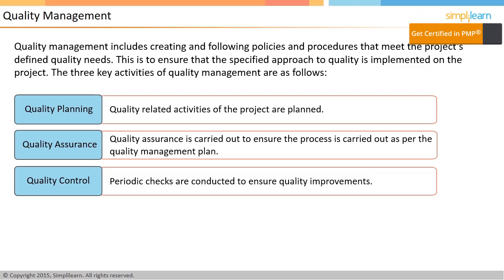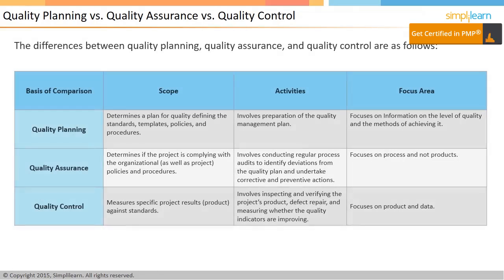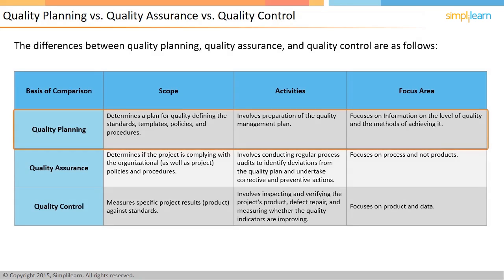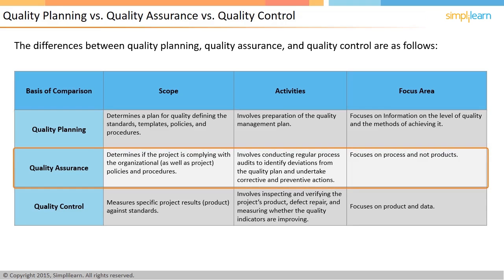In the next screen, let us look into the differences between the three aspects of quality management. It is important to understand the different kinds of activities that come under quality planning, quality assurance, and quality control. Once quality planning is done, the quality management plan is ready. This plan has standards, templates, policies, and procedures to be followed in the project, and it contains information on the level of quality being aimed at and the plan to achieve that level. Quality assurance activities ensure that the activities planned under the quality planning phase get executed for the project. Quality assurance determines if the project is complying with organizational as well as project policies and procedures. This is ensured by conducting regular process audits to identify deviations from what is planned in the quality management plan. These audits are generally done by the quality department of the organization. Quality assurance focuses on the process, not on specific products.